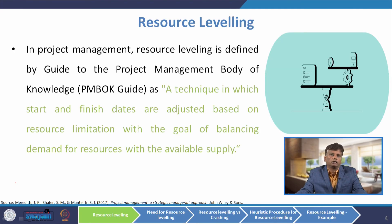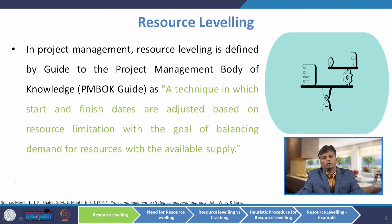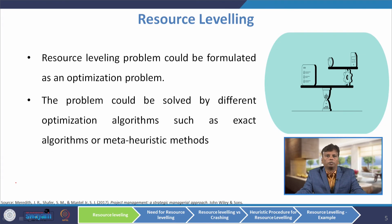In project management, resource leveling is defined by the Guide to the Project Management Body of Knowledge as a technique in which start and finish dates are adjusted based on resource limitation, with the goal of balancing demand for resources with the available supply. So we are going to match demand and supply of the resources. The resource leveling problem could be formulated as an optimization problem, solved by different optimization algorithms such as exact algorithms or meta-heuristic algorithms.